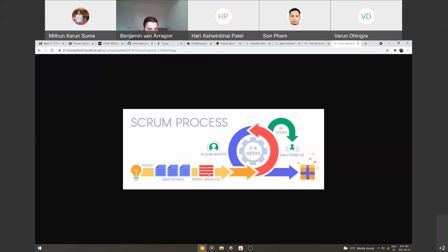So in your sprint backlog, you have 2 weeks, and here's your cycle. You do the design, you do the actual implementation, you do testing and debugging, and then at the end of the 2 weeks, you basically create a final product that has no bugs that you can send to me as the customer in this little gift image.